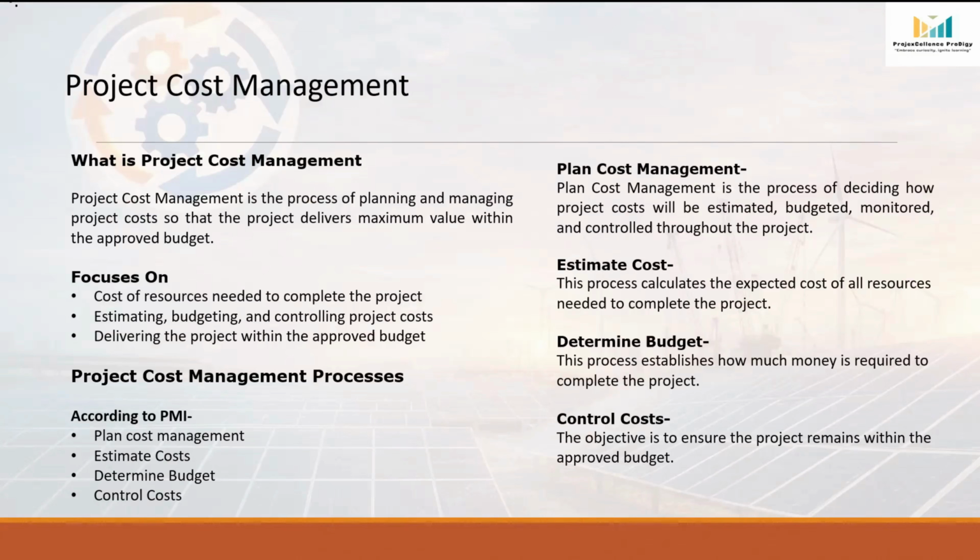In simple words, plan cost management does not calculate project cost. It defines how project cost will be managed throughout the project. Once we know how cost will be managed, the next step is estimate cost. In this process, we estimate the cost of every activity and every resource required to complete the project. Resources may include labor, material, equipment, transportation, accommodation, subcontractors, cranes, and many other project expenses.